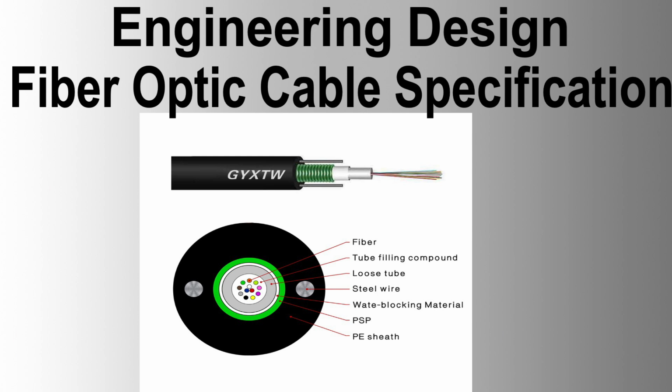Inspection and tests. General. During manufacture, the purchaser or its appointed delegate might visit the manufacturer's shop to verify that the cable meets the construction rules, drawings, and specifications. This inspection is paid for by the purchaser. Inspection procedures are to be agreed upon by the vendor and the purchaser. The vendor shall inform the purchaser of the specified dates well in advance, not less than 4 weeks before the inspection date.